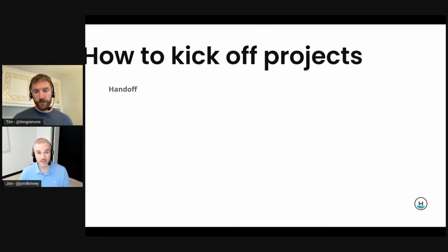Definitely. And then when we get to the end of the project, the handoff is really important as well. And I think it's imperative that we establish what the handoff will look like in the kickoff so that everybody understands what they're going to get at the end of the project. Are you going to be hosting it? Am I going to be hosting it? How is it going to be supported at the end of it? When we are done, are we launched and set it and forget it? Or in all likelihood, am I going to need half the team to support it for 2 months, and then half of that team to support it for the next 2 months until we get some more funding or we understand what the customers think of the existing release? And that way we can establish not only how the existing feature work will cease, but how the project will really transition into its launch phase.